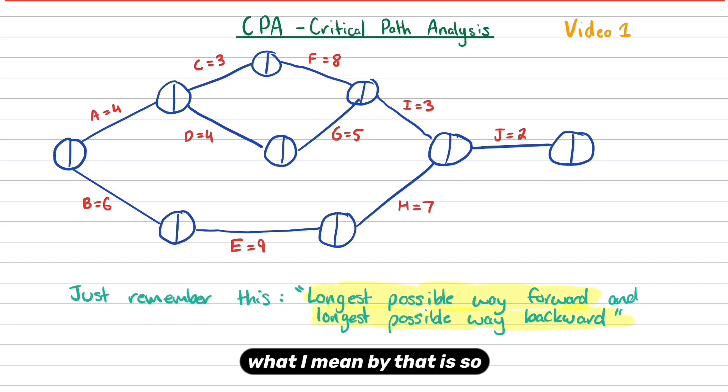What I mean by that is, so we're always going to start with zero, zero. Now, if I was to go forward towards A, it's going to be a four because there's only one possible way I can go there. So the longest possible way that I can go from my start point to the node that's next to A is four. I don't have any other option. In the same way that if I went to B, it's got to be six. There's no other option.